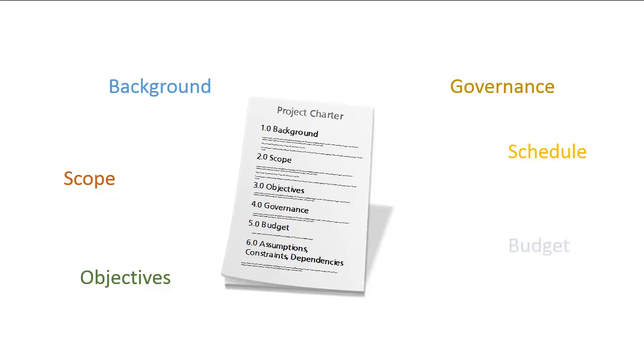After that, include a section on costs. Again, this is either a guess or a target that will need to be verified. It's important to list, by fiscal year, the one-time costs to execute, and any ongoing costs or maintenance the company will need to be aware of.